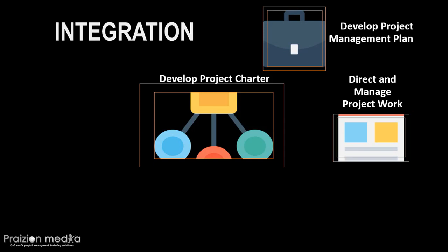Approved change request comes from Perform Integrated Change Control and goes both into Direct and Manage Project Work and also control quality, and also control procurement. Know this dynamic. Also observe that the recurring theme of work performance data originates here. To fully understand what I am talking about, open up to Figure 4-1 and observe the numerous ITTOs I am mentioning here.